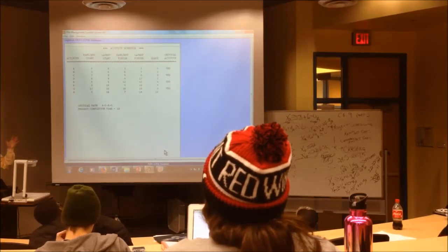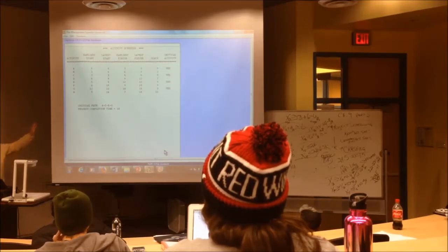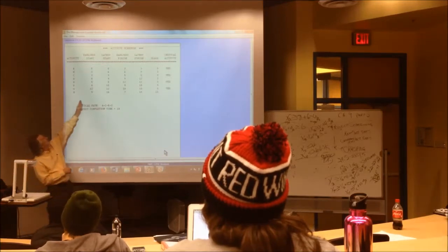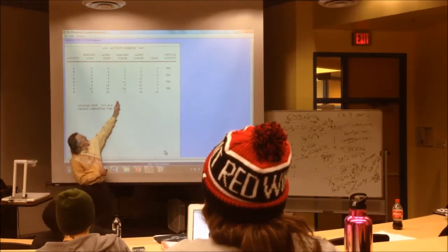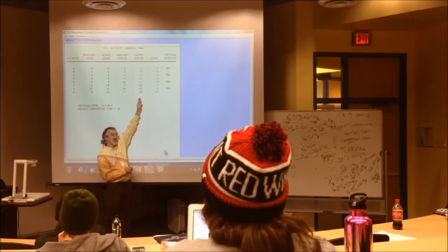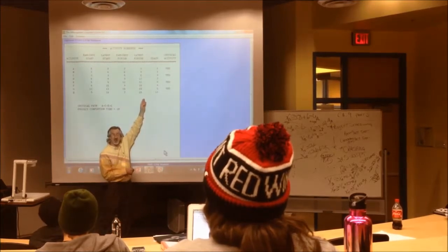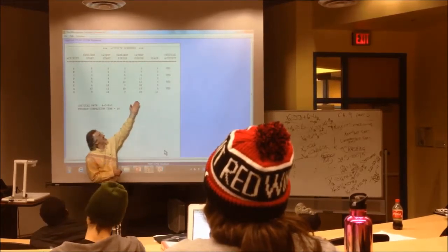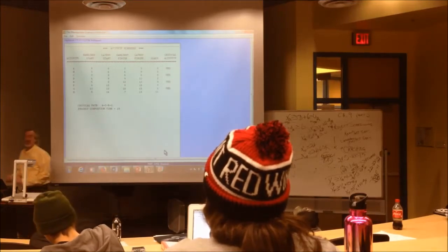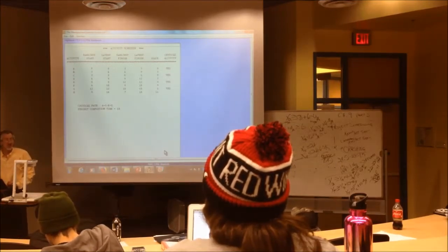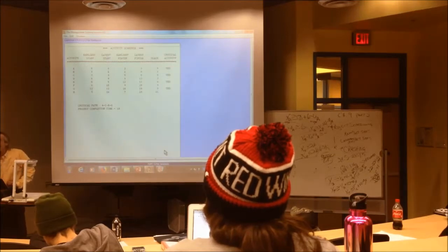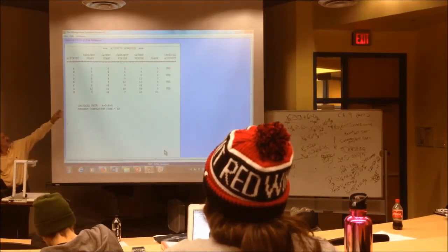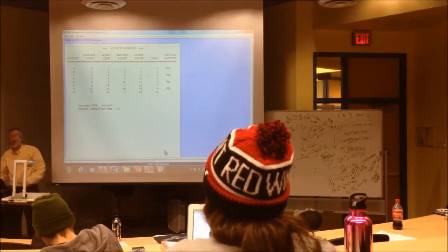Look at where those who were able to answer this quickly looked. They looked at earliest starts, latest starts, earliest finish. It's the latest finishes that will give you the project time. The biggest number of latest finishes is 18. The expected time for this project is 18. Critical path is ACEG. It has yeses there, it has 0 slack, and it literally gives it to you right there.